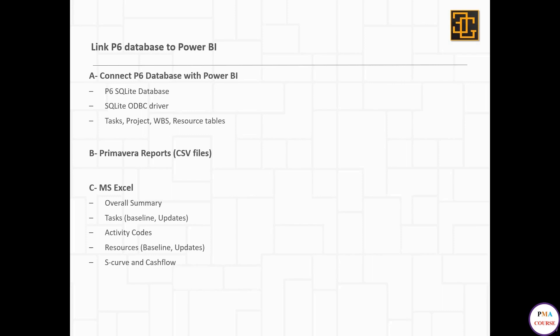To prepare your Excel file, you can export your data from Primavera to Excel, or you can simply adjust your layouts, prepare your columns, and copy and paste into Excel. This is the method we'll use in this course.